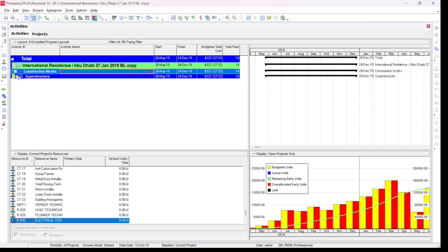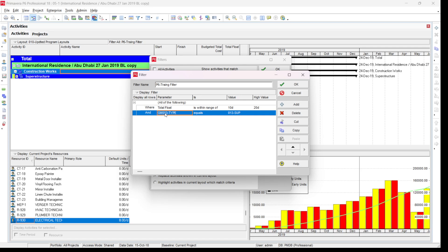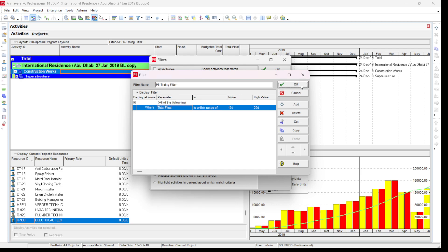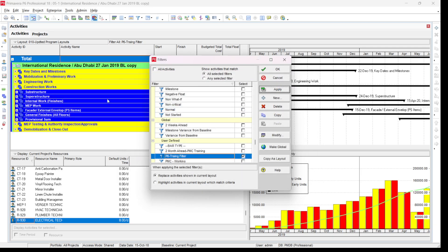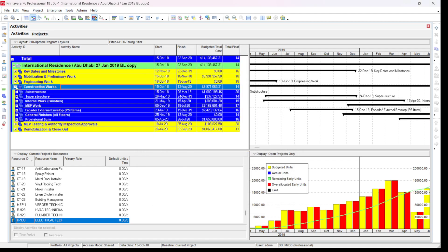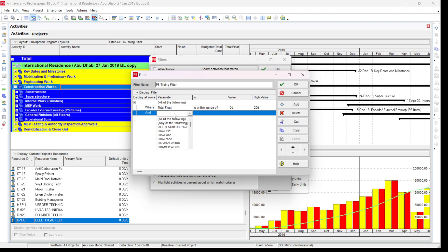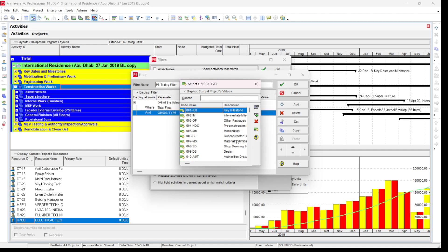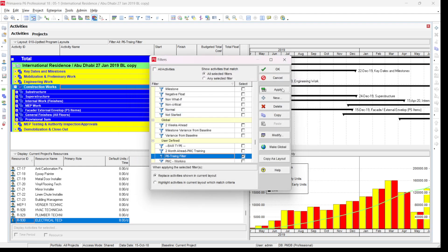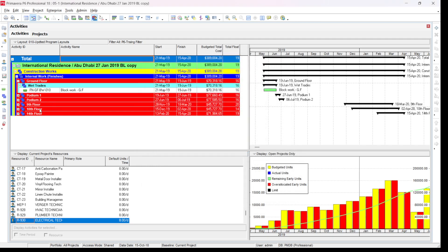You can see it will show only the superstructure. If you go again into the filter and remove that criteria and apply, you can see all filter categories — for example, engineering, construction, superstructure, substructure, internal tasks, finishing, MEP, and facade are all shown. To show only critical activities on the superstructure, define the filter with 'Type equals Superstructure'. Similarly, you can select finishing items — type equals finishing — and it will show all finishing tasks; for this project, floors 9, 10, and 14 are on the critical path.